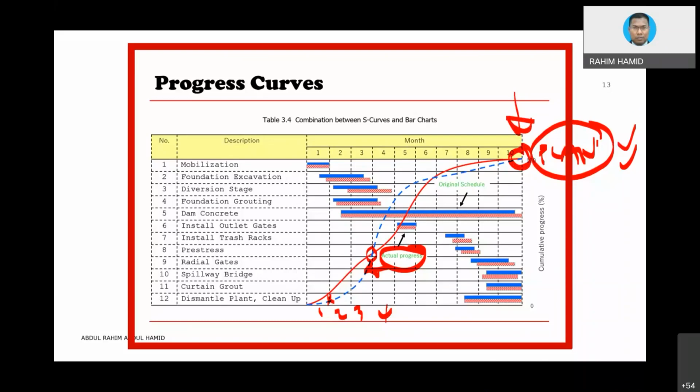You notice that that is the project requirement. Unless something happens, for instance, a COVID situation, whereas you simply cannot do anything, you can be entitled to what we call extension of time. So this can be extended a little bit, that should be fine. But when you are given a 2 month extension of time, you should complete within those 2 months. That is what is expected from any client, okay?